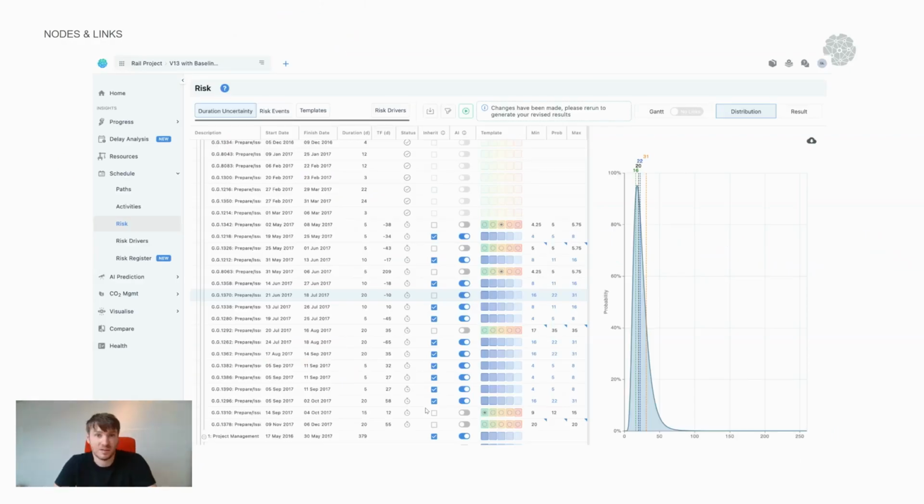And this is part of that system that you'll now start to look at when you go through the courses in action. Here, for a 20-day duration activity, the AI is suggesting an actual duration of 22 days, but I can turn it off and I can tell it to shut up if I want to. You are in control. You are in charge. AI serves us as humans. It does not dictate to us. And that is a core principle of Nodes and Links. And we can come on to some of the core morals and beliefs that we have in a moment.